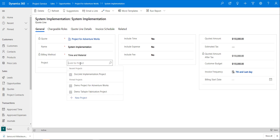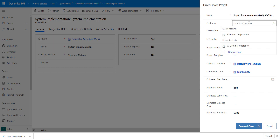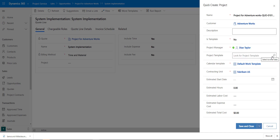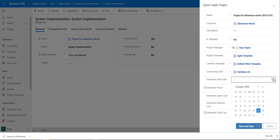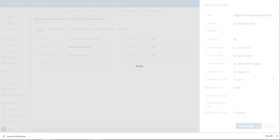The first thing I want to do is create a new project. I'll click New Project and call it Adventure Works, optionally including the quote ID. I can add the customer, a description, and select a project template — in this case the Agile template. My contracting unit is brought over automatically. I'll put in an estimated start date of November 1st. Since I selected a template, estimated hours and estimated cost are brought over. I'll save and close, and the system will create the project in the background.